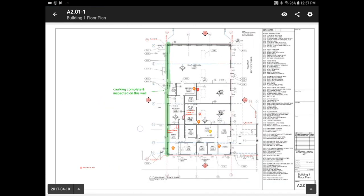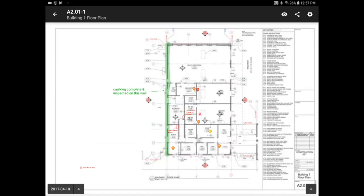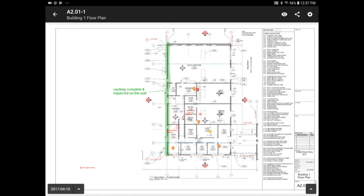You can also swipe up and down between old versions of plans. There will always be a red watermark on previous versions, so no one will ever be working off the wrong set of plans. You'll notice that there is a date on the bottom left. This refers to the version of the drawing that you're looking at.